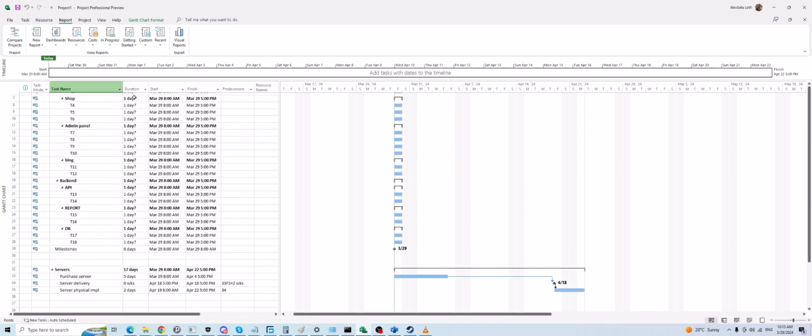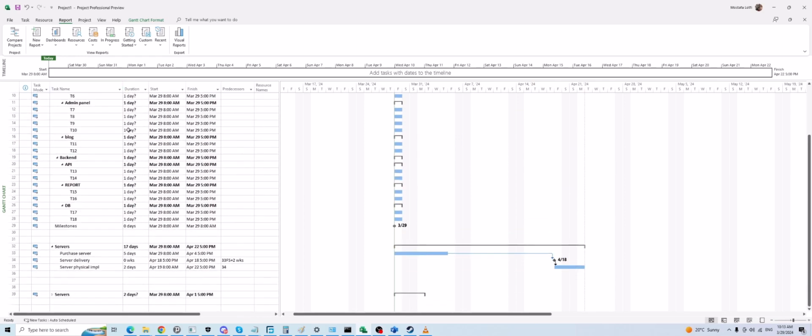Let's say in your project plan you have 500, 600 tasks. It doesn't matter for management. They don't want to bother to go into details for those tasks. They just want to know if that project has 5 main deliveries, what is the status of those deliveries, and what is the expected date to deliver them. And those deliveries, you can define them as milestones inside of your project.